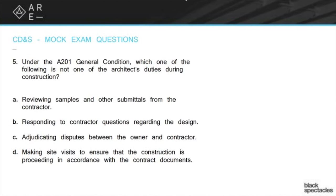So: IDM, mediation, and then arbitration. Arbitration is similar to mediation except the third party — or panel — is essentially acting as a judge and jury with specific legal weight. That legal weight comes from language you agreed to in your contract. You can also have mediation binding written into the contract. Then the final stage is litigation.